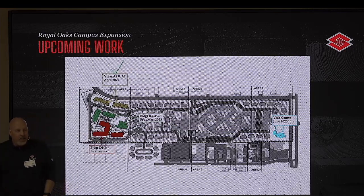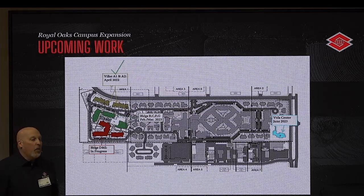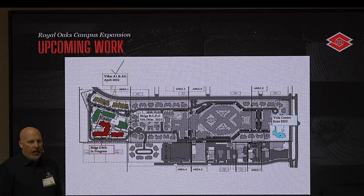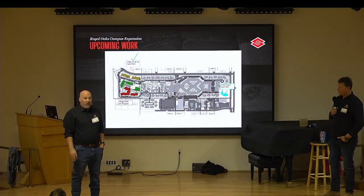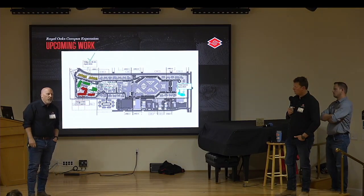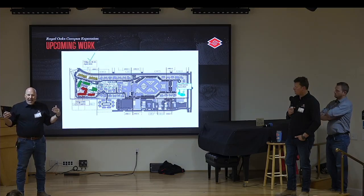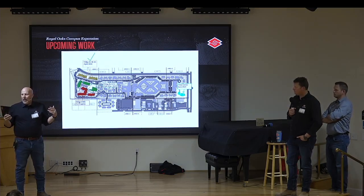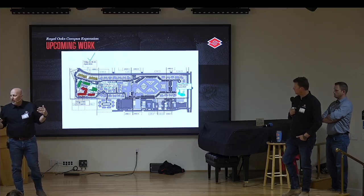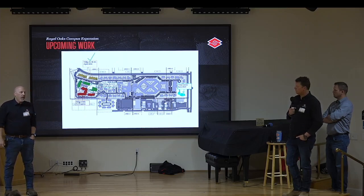But next month, when you ask me again, is that still August? We are looking at August, but we're trying to improve on that, because what we really wanted was more like the 4th of July, into June. And we're running a little bit longer than that right now. If we can get all the manpower on the other buildings to commit to staying here and all going to that building, then I'm confident we can speed that up a little bit. But we're trying to schedule it more as a worst case scenario, to be honest, and let everybody know what's going on.